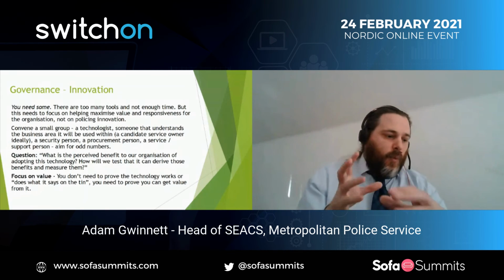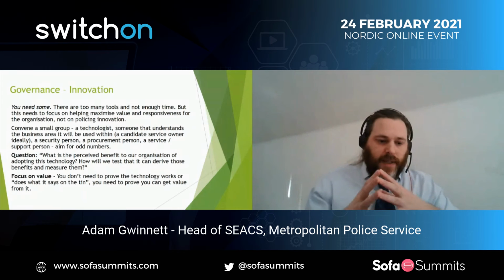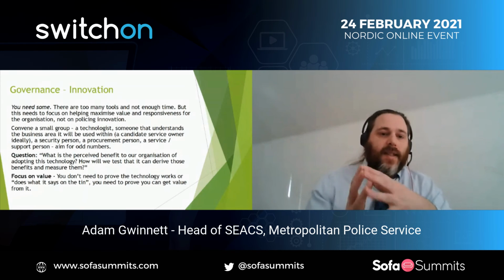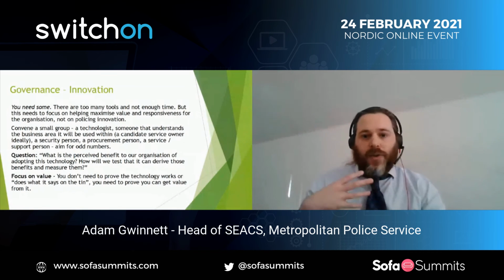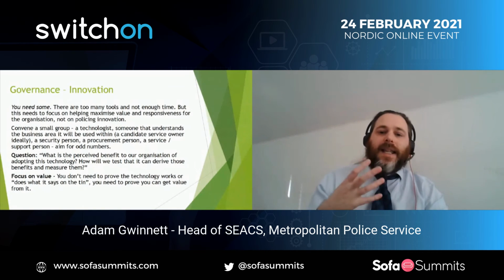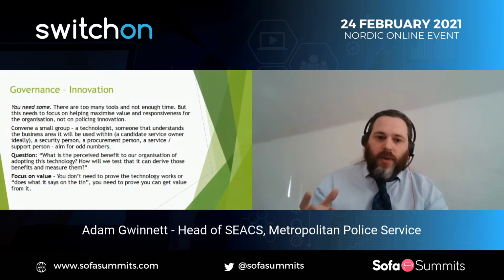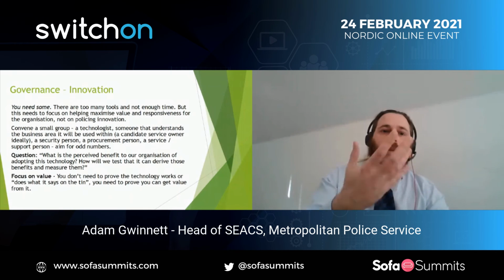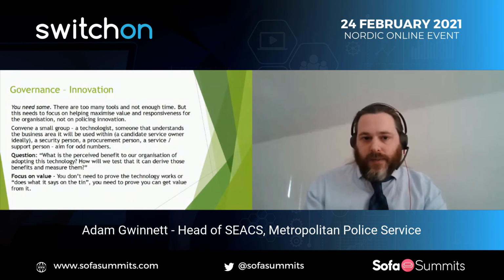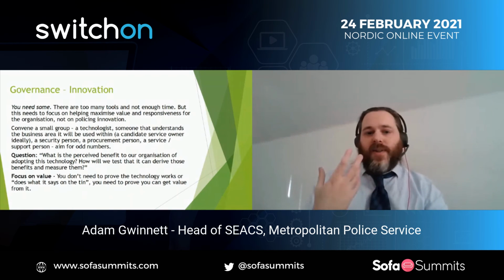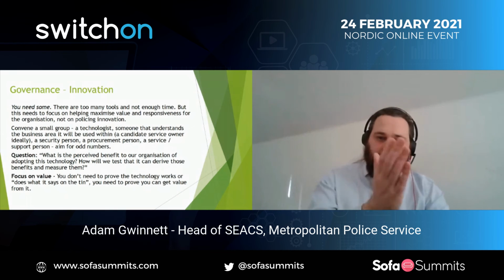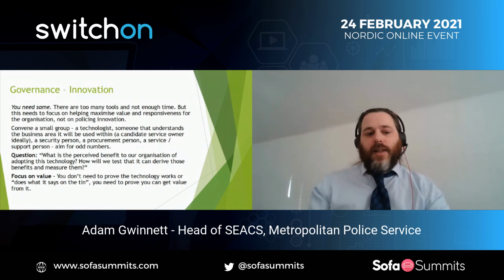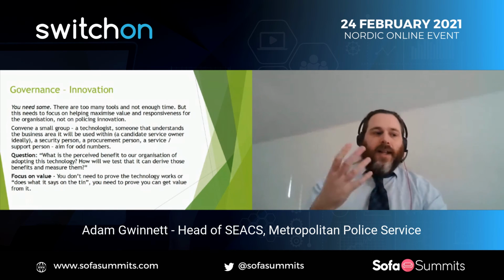So effectively, what we used to do from that was not only agree things to go forward, but also set the success criteria for those innovation projects, which would be focused around the value the organization could derive from it and getting that quantifiable as much as possible. So effectively what you'd say is, we believe this can save X amount of staff time. As an example, we believe it'll help accelerate our responsiveness. Therefore, your success measures will be, well, then you've managed to gain X amount of efficiencies in terms of people processing things. That's a nice, easy one.